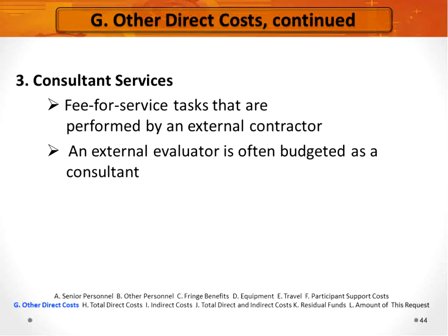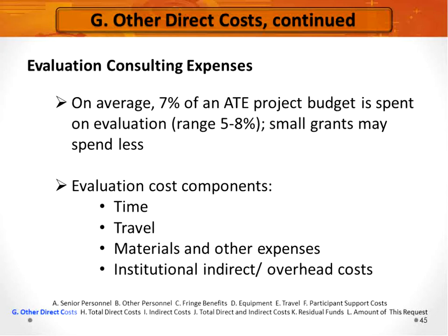An external evaluator is often budgeted as a consultant to the project. You can see here some average ranges for how evaluators can be budgeted and some components to think about when budgeting for evaluation: time, travel, materials, and any institutional indirect or overhead related to that.